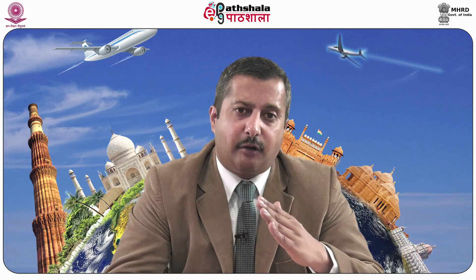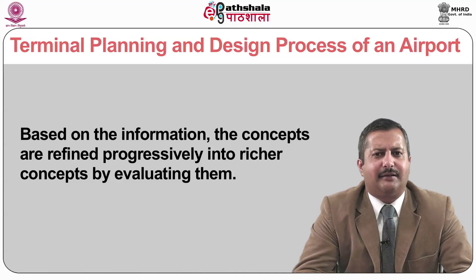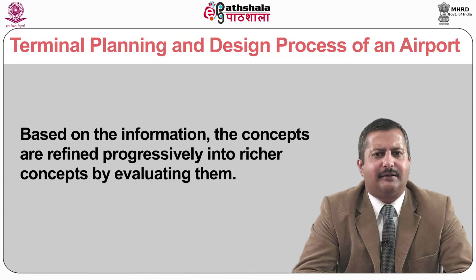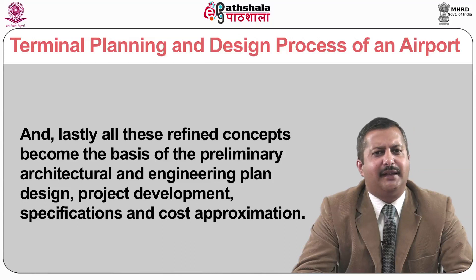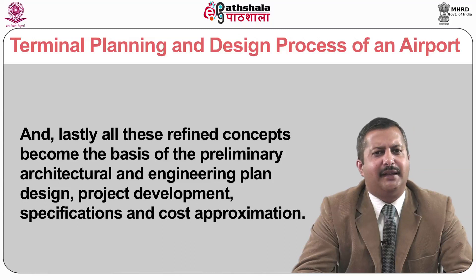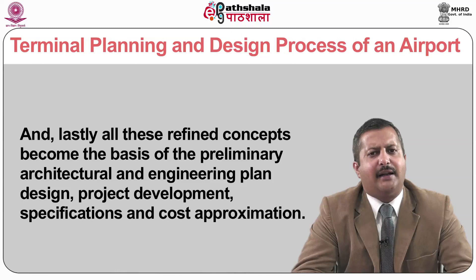And secondly, in determining forthcoming predictions of the airport traffic depending on passenger flow, cargo drift and airliner schedules. When all these two aspects have been worked out, the terminal planning starts. Based on the information, the concepts are redefined progressively into richer concepts by evaluating them. And lastly, all these refined concepts become the basis of the preliminary architectural and engineering plan design, project development, specifications and cost approximation.